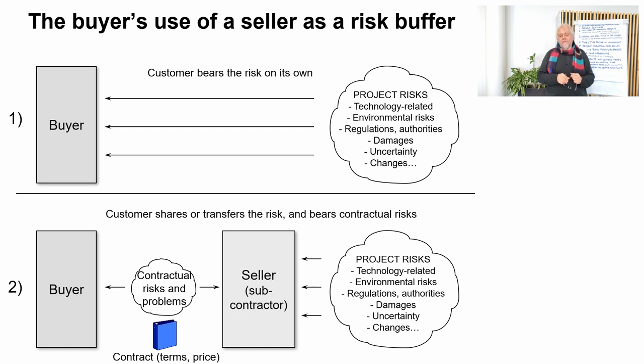commits to a fixed price contract, and the buyer also initially wants to make this contract, and they sign the contract, and then if the buyer wants to change the scope of the fixed price contract, it can be that the seller can charge a lot from the buyer as a kind of compensation for now having some extra costs of having been prepared for this fixed price contract, and now the buyer wants to have something else. And so you are kind of married to the seller,